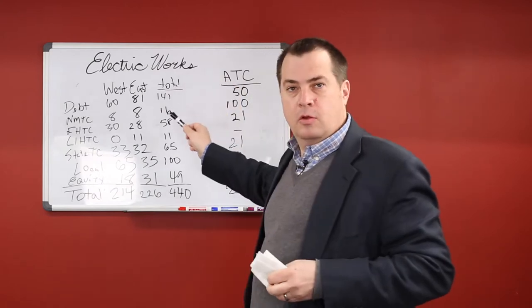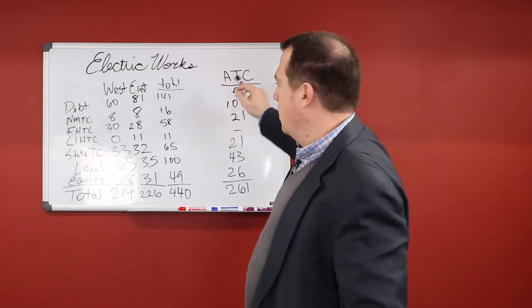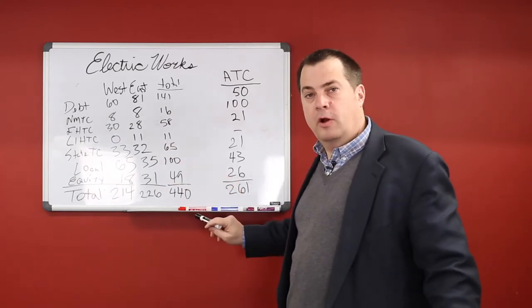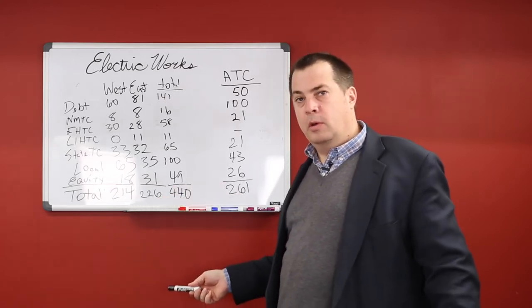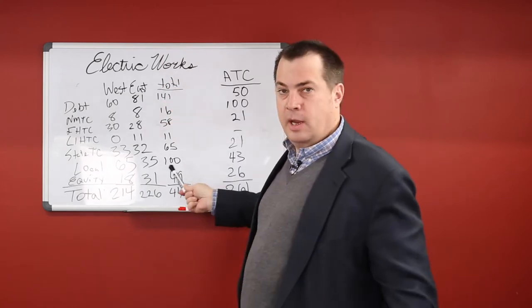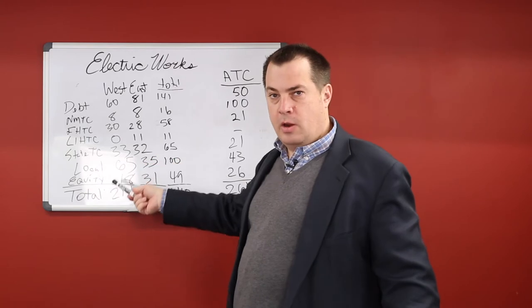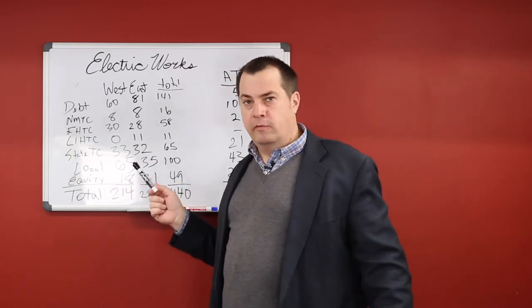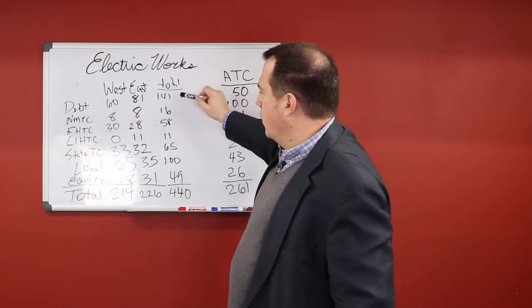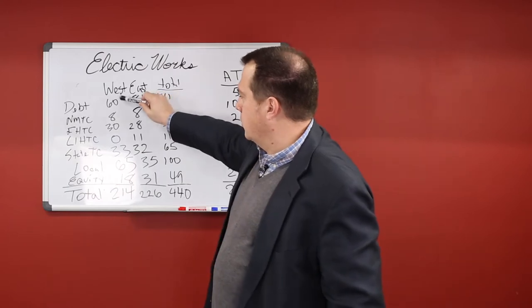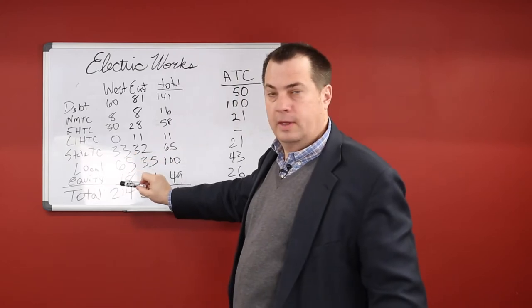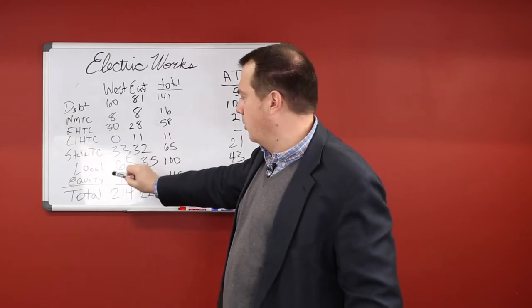But what we have here, this is the capital structure for the Electric Works project. So all the sources of the money that's going to make up the total of $440 million that we talked about before. And the basically $220 million per side. This is the west side and the east side. And these are all projections and may change. But this is what has been shared with council by the developers.